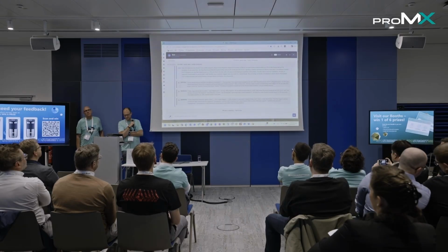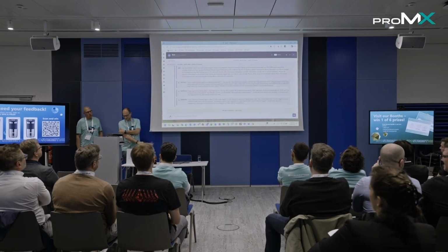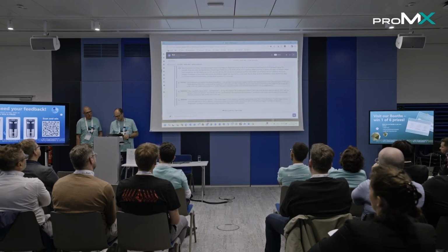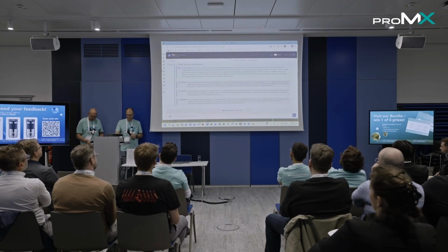Overall, 12 projects are now red, keeping you in a 33% structural risk zone, with cost pressure emerging as a portfolio-wide pattern. You also have a resource imbalance. 14 hours of overtime concentrated on one architect, while another key contributor logged near zero time for a second week. The one thing I would do immediately is review Azure's final phase cost containment plan and secure backup coverage before completion risk compounds.